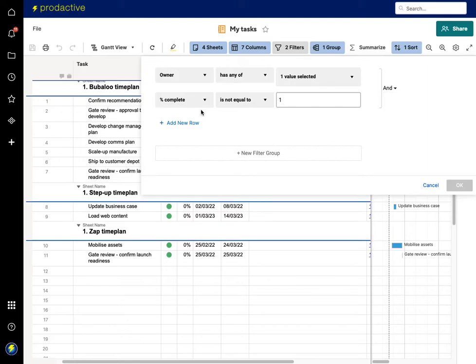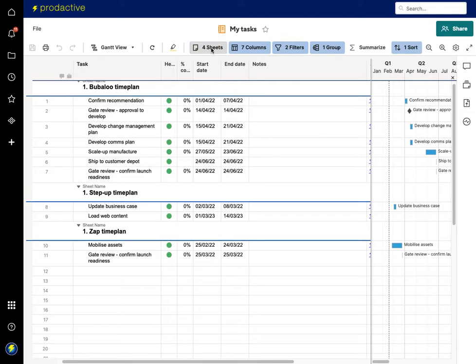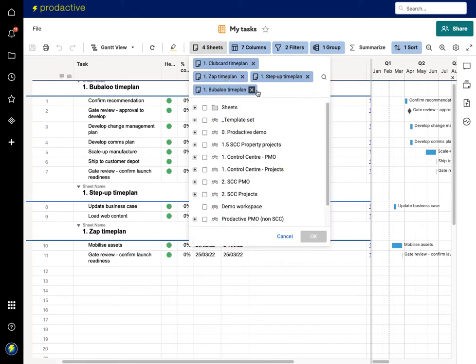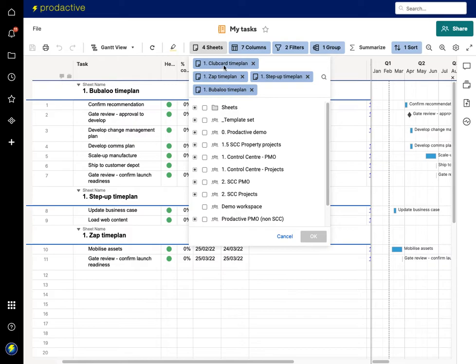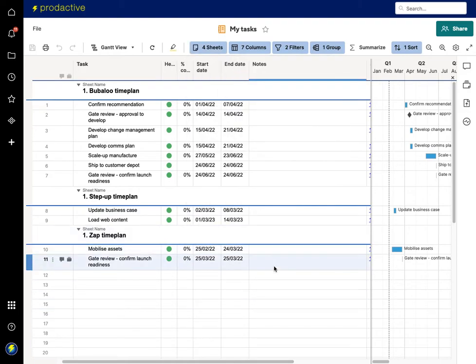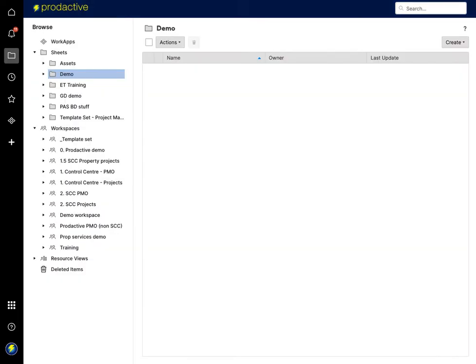You can set up all sorts of different filters in terms of what time frame to include. In this case it's a simple filter: anything that's not complete that I need to do. This is pulling information from multiple sheets — four sheets in this example — and it serves up what's needed for the various people. So how does this actually work and how do you go about doing it yourselves? The first thing to do is create a report, and within the report you bring in the filter. You can do that for one project or one actions log, or you can do it for multiple ones.